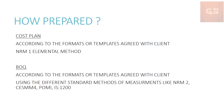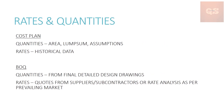NRM1 is usually used to make a cost plan. Depending upon the client, the project, or the company, there might be different templates or formats specific to that company with which cost plans or BOQs are prepared. For BOQs, standard methods of measurement are mostly used, but for cost plans, the way it is prepared can differ according to different templates.